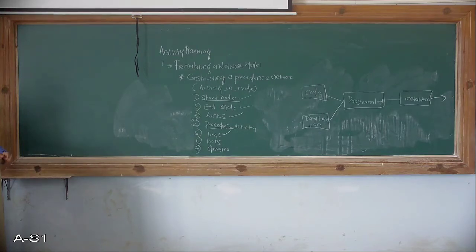Here the precedents are the immediate preceding activities. The program test cannot start until both code and data take on have been completed, and activity install cannot start until the program test has been finished.